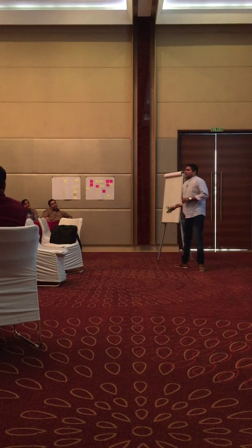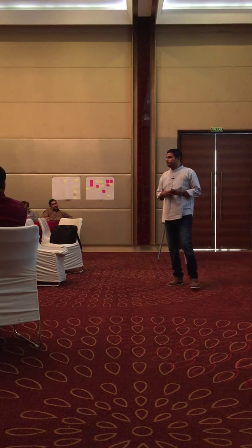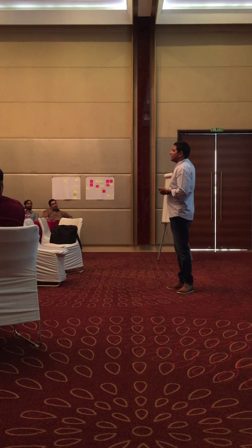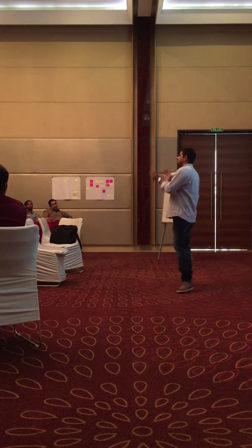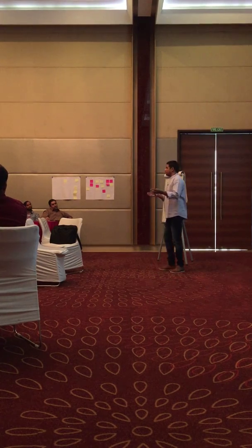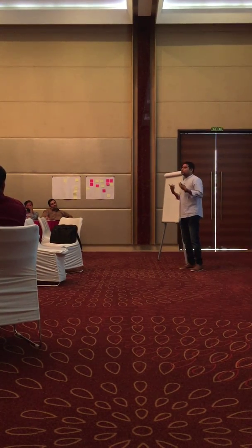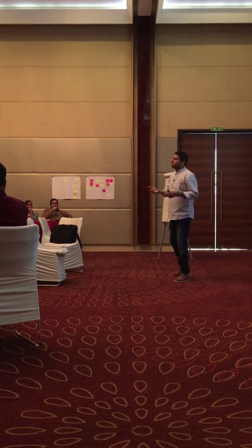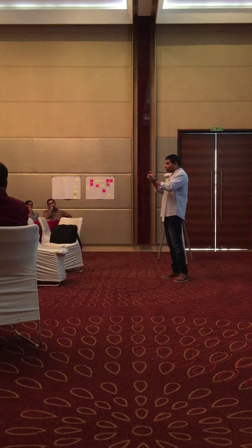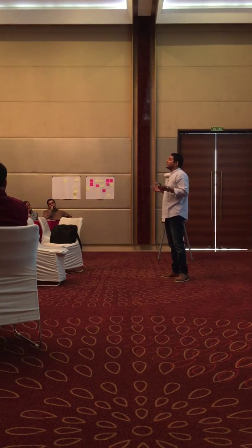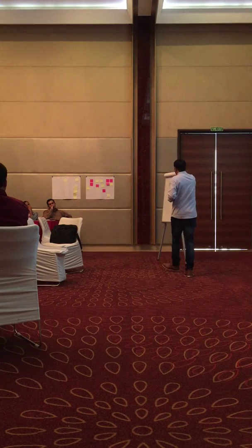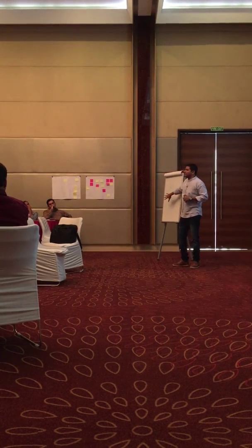Now, is the definition of done static or dynamic? That means in my first sprint, I completed sprint planning and created this. Can I use it for the 10th sprint? No. Why? It might change, the team might have so much learning, right? If you go to the Scrum guide, especially for definition of done, the more experience you gain, the more time you spend in Scrum development, the wider your definition of done becomes, because quality is important. So this completely drives quality; it is a quality gate, your definition of done.